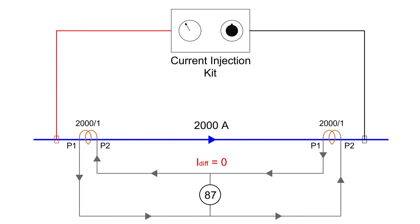But what if during commissioning, CTs were connected with the wrong polarities? In this case, a net differential current will flow through the relay. If this value exceeds the relay's setting, the differential protection will operate and trip the breaker. This is not what we want.